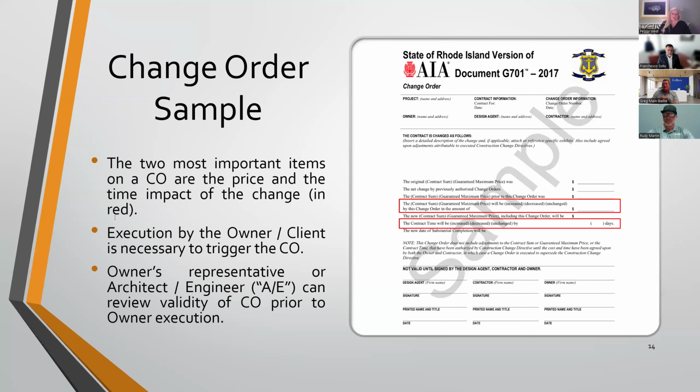And how we typically plan for those, or recommend clients planning for them, is if we're doing an exterior facade as an example that has a lot of stucco replacement and a repaint. The repaint is a quantifiable number. In other words, your contractor is going to give you a price to repaint and reseal your building, and that is going to be a lump sum number. The number that is going to be unit-based price is square foot of stucco repair, right? And or structural repair. And until you define and remove that stucco, you're not going to know what that true value is, right?